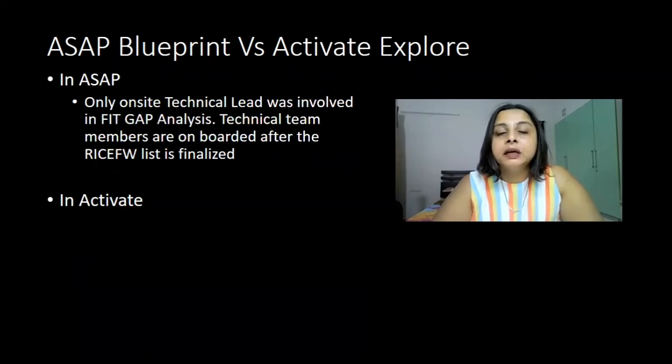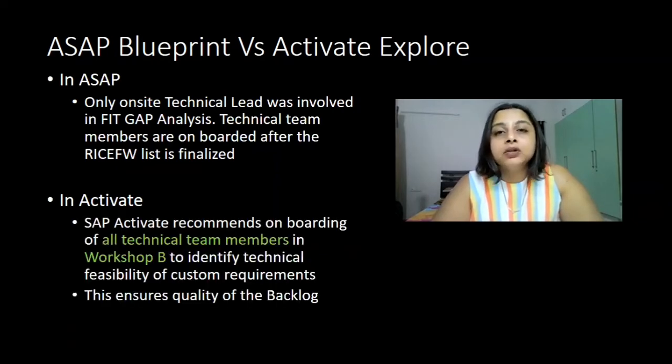Now, the next point is that in case of ASAP, there used to be only one single technical lead who was involved in the fit gap analysis. If the team was larger, you might have multiple technical leads per module, etc., to finalize the requirements. And all the other technical team members used to get onboarded quite later on in the project once the realization phase had started. Now, in case of Activate, SAP recommends that you onboard all your technical team members in